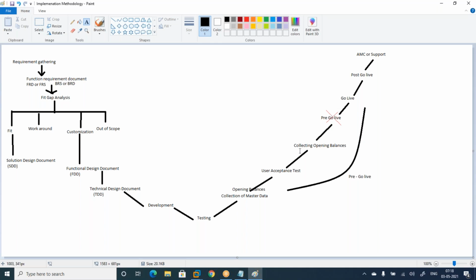Yeah. So for the 1st to the 30th of June, whatever transactions are in the system, you can have a delta, that is those 30 days of transactions, add to your repository and make that as production, or alternately you can recollect everything from zero.